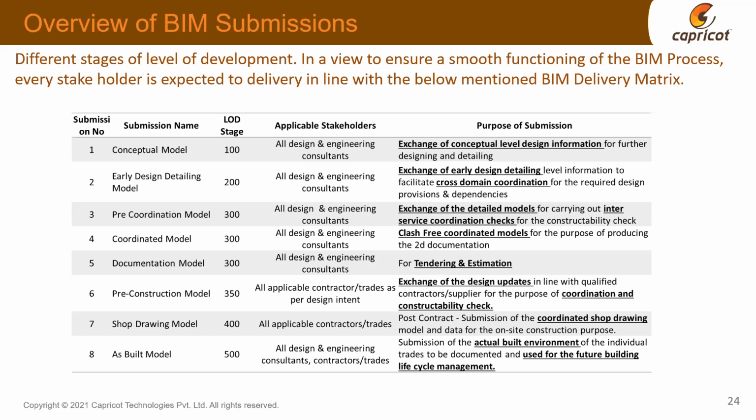Further, there is LOD 300, which is the pre-coordination model. Again, these design and engineering consultants will exchange the detailed models and do the inter-services coordination. Further, LOD 300 includes the clash-free coordinated models. Next is the stage for the documented model, which is LOD 300 again. This is for providing the tendering and estimation.